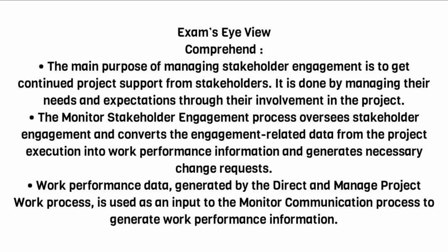Exam review. Comprehend. The main purpose of managing stakeholder engagement is to get continued project support from stakeholders. It is done by managing their needs and expectations through their involvement in the project. The monitor stakeholder engagement process oversees stakeholder engagement and converts the engagement-related data from the project execution into work performance information and generates necessary change requests.